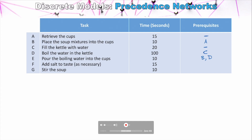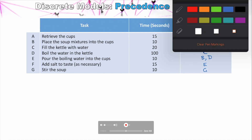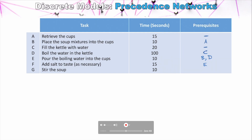For adding salt to taste, we'd want to have poured the boiling water into the cups first, so that has a prerequisite of E. Then stirring the soup to finish — you want everything in there before you start stirring, so the prerequisite is F. Now that we've established what the prerequisites are, we can show a visual network diagram that illustrates this, and use that diagram to work out the most efficient path to complete the project.